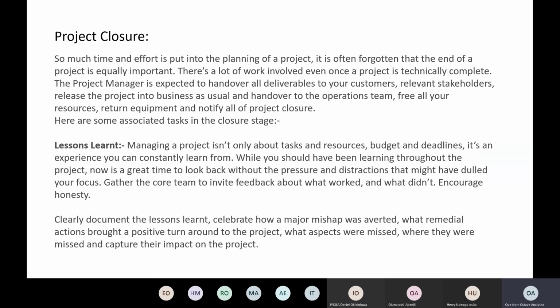Your handover document is going to contain all your set goals and deliverables and the timelines in which they were achieved. You can use your Gantt chart for that, but in the Gantt chart, you just have your completed tasks color coded. You can color code your completed tasks with a green color. Maybe there are pending tasks that you could not achieve due to certain unresolved challenges. Then you can color code them as red.